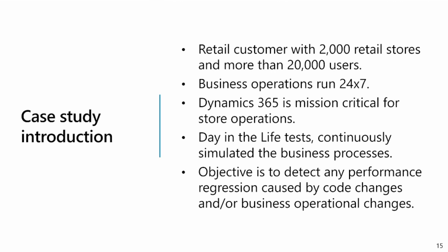So that's why we have to set up day-in-the-life testing in the testing environment to simulate the key scenarios, to find out any unhealthy performance before and after go-live. And we need to perform the live testing with continuous operation in the system. As I mentioned, the business operation is running 24/7, so our day-in-the-life testing is required to keep running, and we don't stop it until we agree to stop. We also simulate the same maintenance window for each platform update and promotion. It can help to find out the impact between the maintenance window and the business operation.